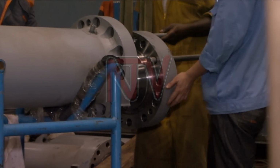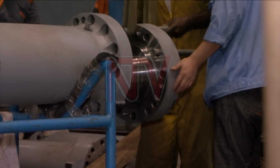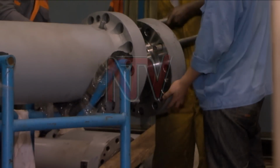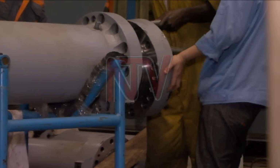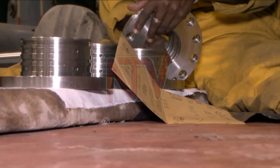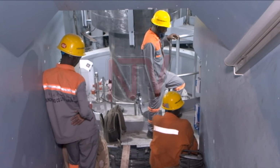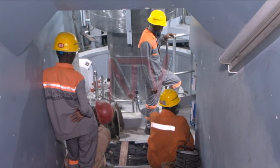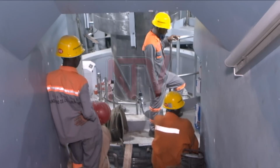When the ring gate was opened, it was discovered that there was a synchronization error with one of the servo motors which control rotational motion. This meant that the entire wet commissioning process had to be halted. Another investigation had to be undertaken in all the turbines. It also meant that commissioning the dam by the end of this year is not possible.